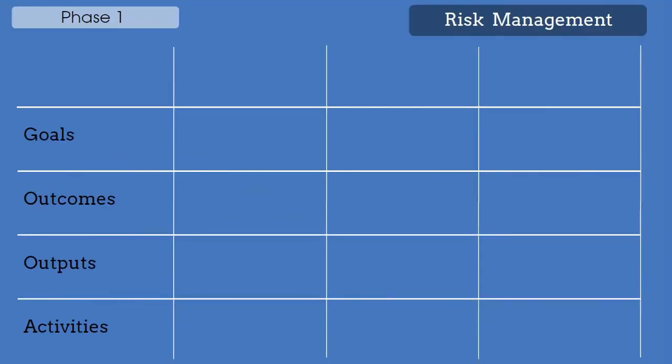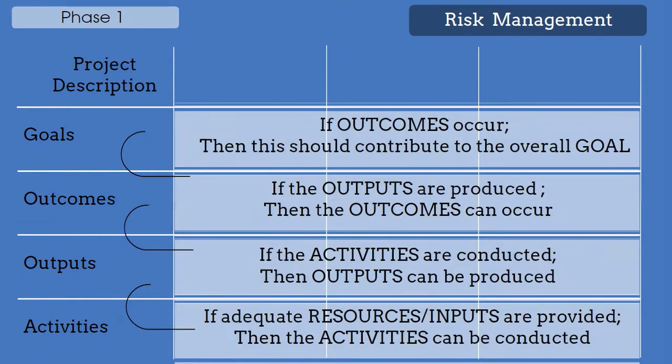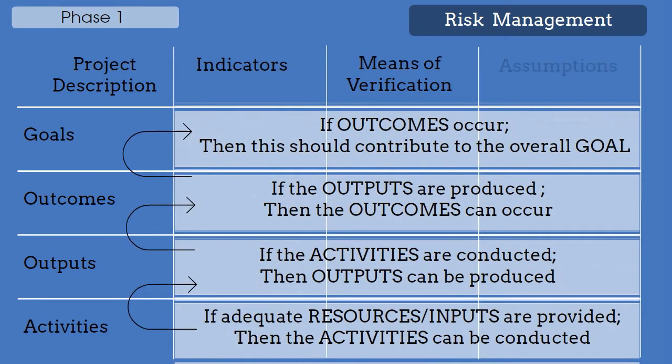A log frame helps you to design your project by clearly defining the scope, causal logic, indicators of success, and assumptions. Along the way, as you analyze your stakeholders and identify assumptions, the first risks of your project begin to surface.